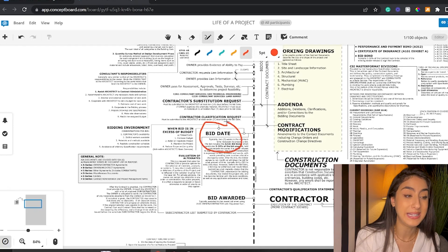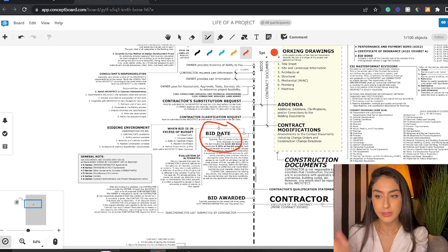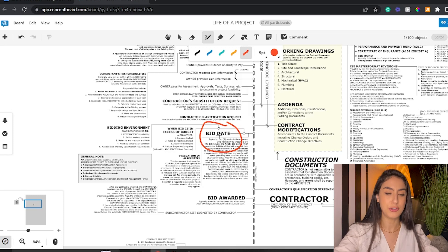Once they're done pricing everything, the big day comes — that's called the bid date. Every contractor has to send their bid price on time to the architect: pencils down, send your drawings and pricing. The architect and owner open the bids and look at the prices: one contractor says $200 million, the second says $100 million, the third says $90 million. The owner might decide the $90 million seems too cheap with potentially low quality, the $200 million is not justified, so they go with the $100 million. The owner awards the bid to that contractor, everyone is happy because construction is finally going to start — but not so fast.